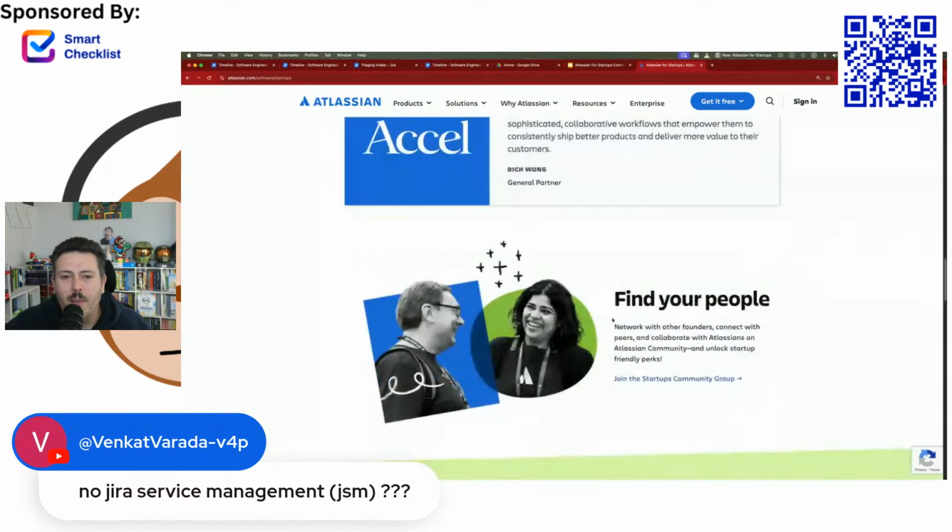Like I have a conflict here, which means I need to push a date out, but now I broke something else. So now we have to negotiate resources and dates. Maybe we have to pull in our product managers and whatnot. But now you can start compromising with facts and data, as opposed to just talking really loudly in a meeting. And so this, my friends, is what makes this super valuable and special, because the plan is the only place where you can do this cross-collaboratively.